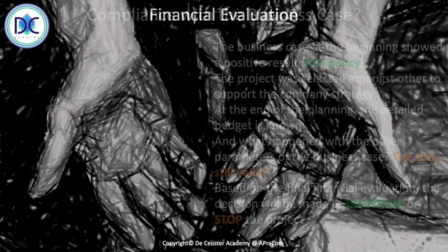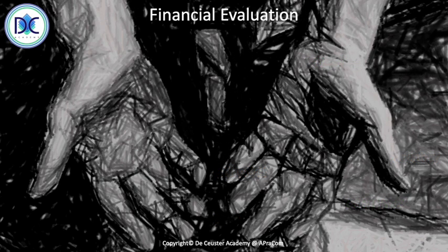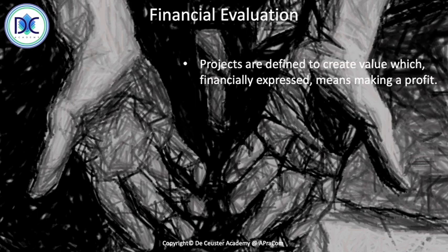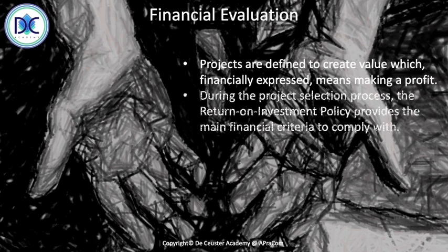First element I spoke about was a financial evaluation. The financial evaluation is needed because projects are created to create value. And this is typically expressed as making a profit. Now we can look at profits in different ways. There are different parameters to evaluate the value of the project, but the easiest way is to look at the profit. We must compare with the return on investment policy and see if our project, when the planning is completed, complies with the return on investment policy that we started with.